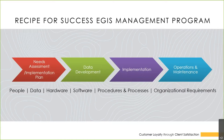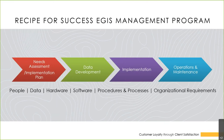Now let's talk about the recipe for success — implementing an EGIS management program takes a lot of process. In some cases a client may never have had a GIS program, or they have data in various formats: paper maps, digital maps, survey data, AutoCAD files. I highly recommend starting with a needs assessment and implementation plan, which helps us understand their processes, procedures, organizational requirements, hardware and software they have active, and the people who would use the program.